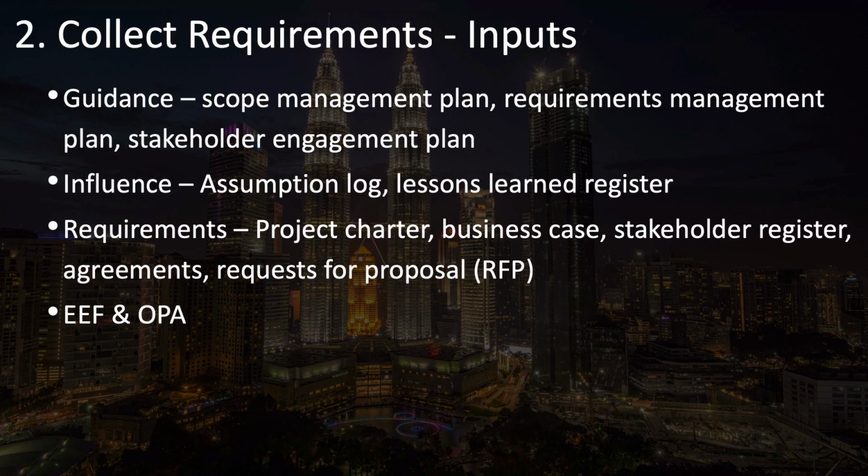Your scope and requirements management plans tell you how to define and manage scope and requirements. So you'll definitely need those in the collect requirements process. Also, your stakeholder engagement plan, because that's where you define how to engage with the key stakeholders for them to participate in collecting requirements, as well as engaging with the rest of the project.